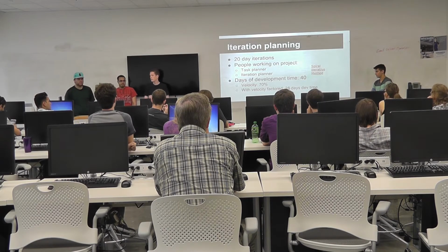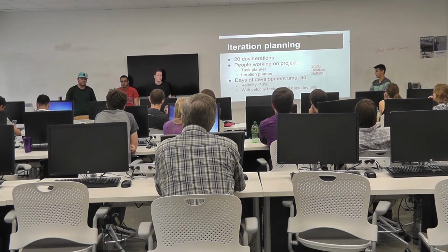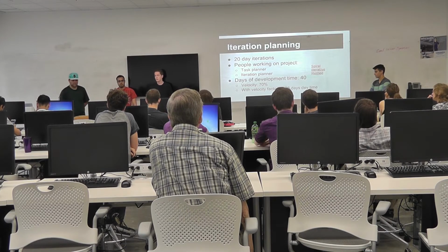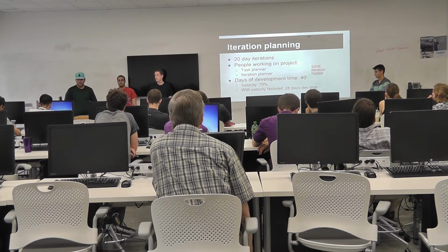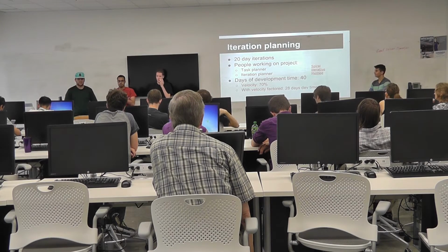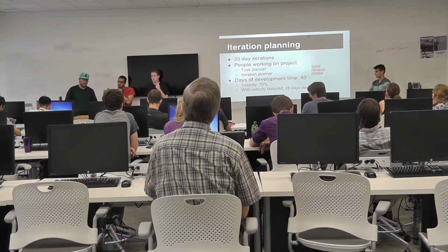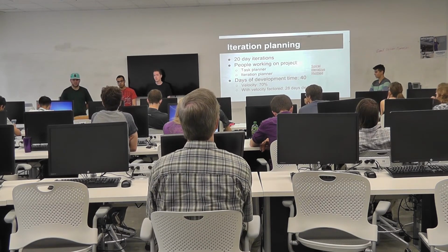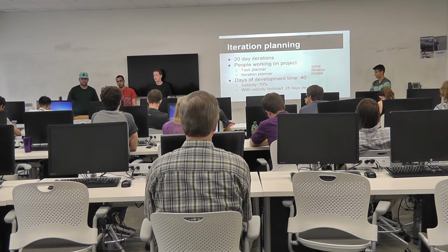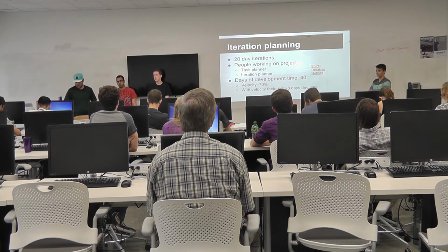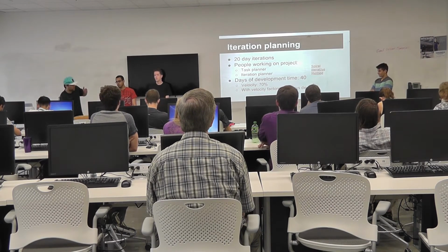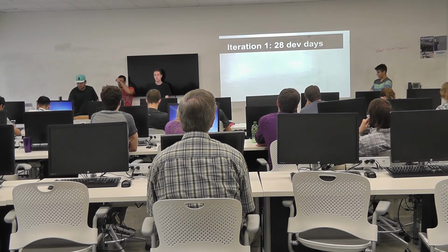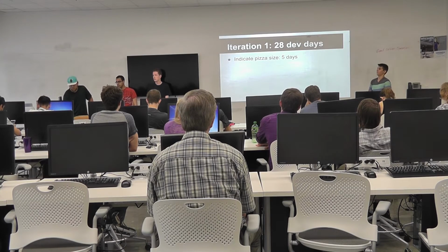Alright, so as the iteration planner, I figured we'd have about 20 days to actually work on it. Because we have two programmers, myself and our task planner, we had a total of 40 development days. Now, our team is efficient, but not ultra efficient, just because we're so hands-on. So we had a 70% velocity. We only had 28 days of actual programming time without meetings, replanning, rescheduling, and meeting with our user to test things. The user did a lot of black box testing for us.